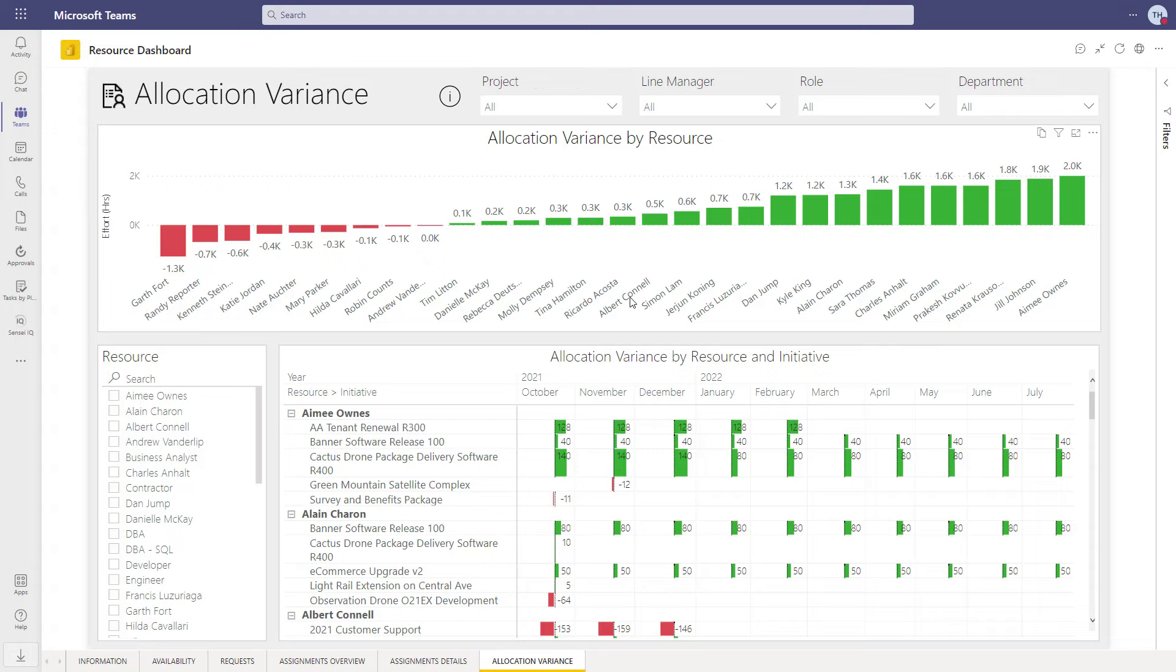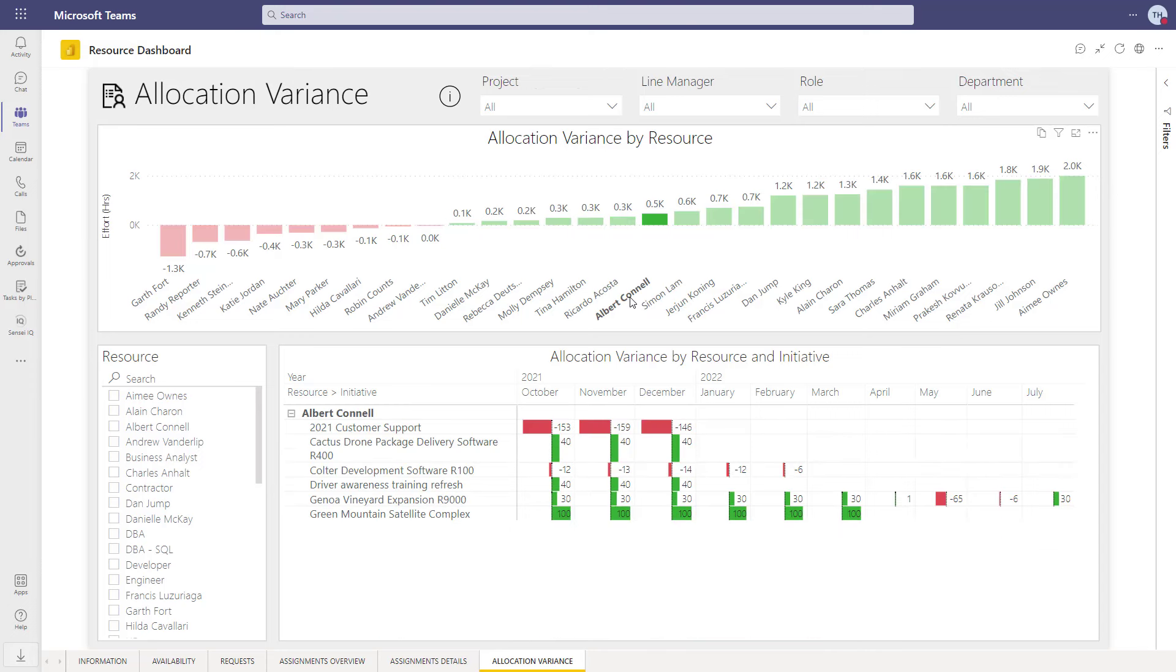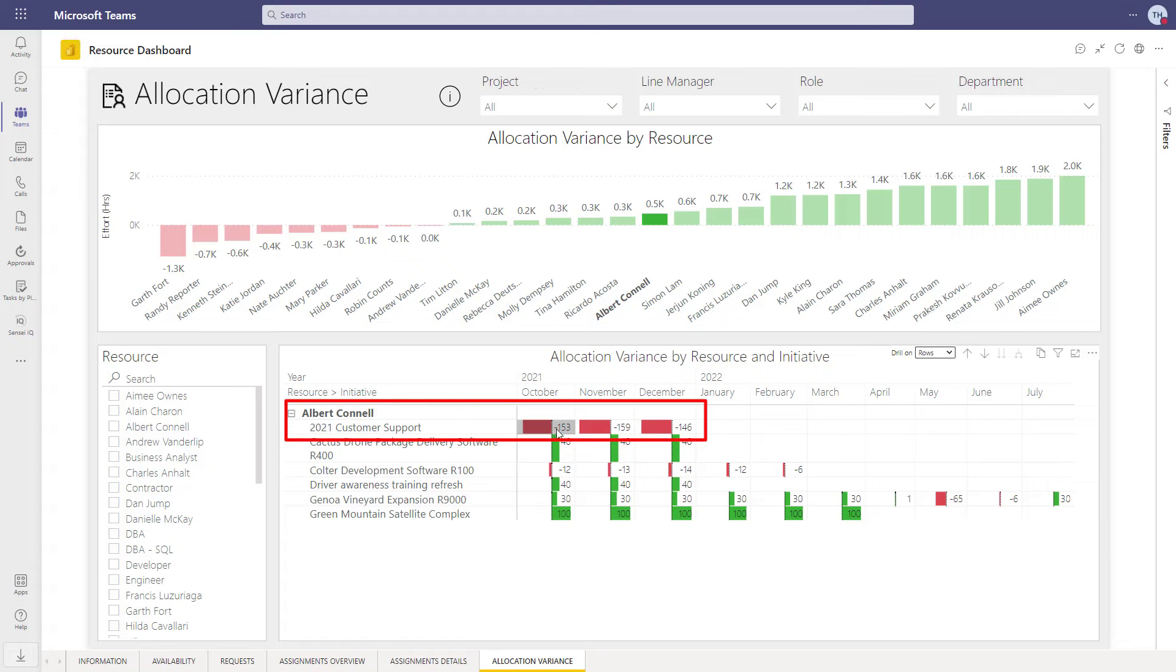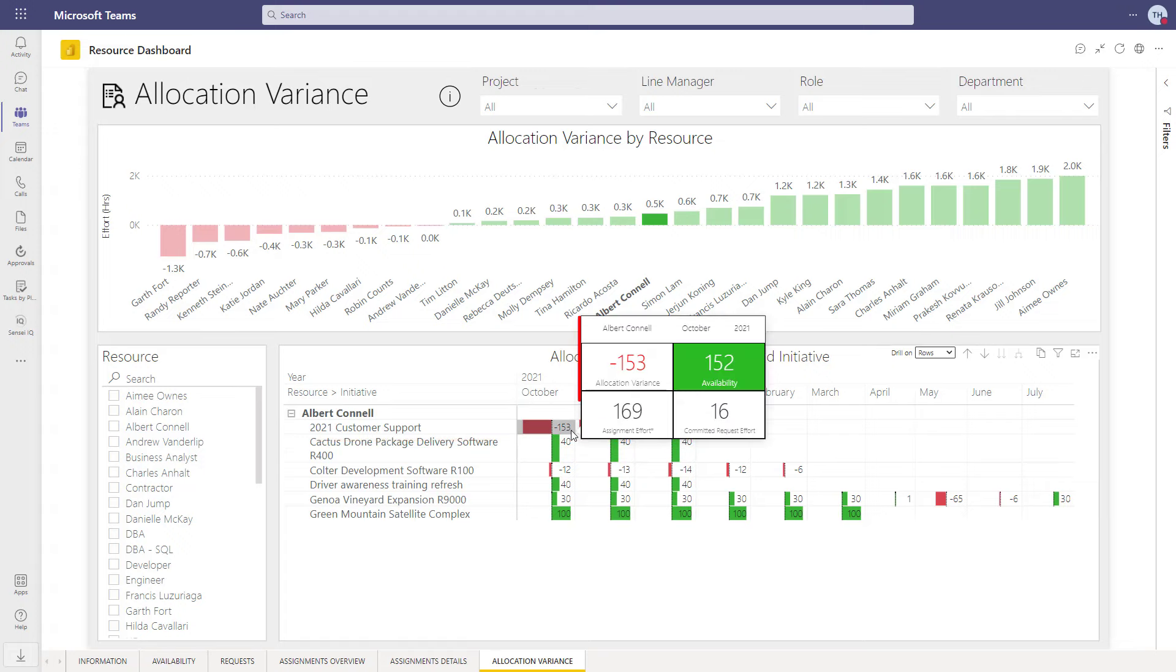In this view, we are comparing the approved allocations to assigned work on projects. It looks like the 2021 customer support project is assigning a lot more hours to Albert than what we had approved.